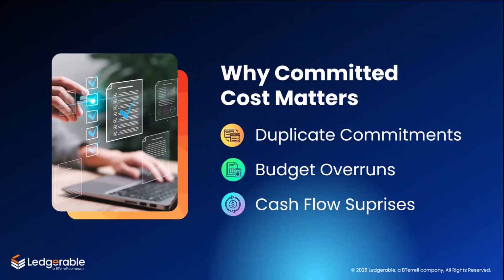Once they had realized that, and after moving to Sage Intacct, that they had this visibility, they avoided cutting checks they couldn't cover, and they started requiring every PM to review the committed cost report on a weekly basis. It completely changed the game and changed how they manage cash flow.